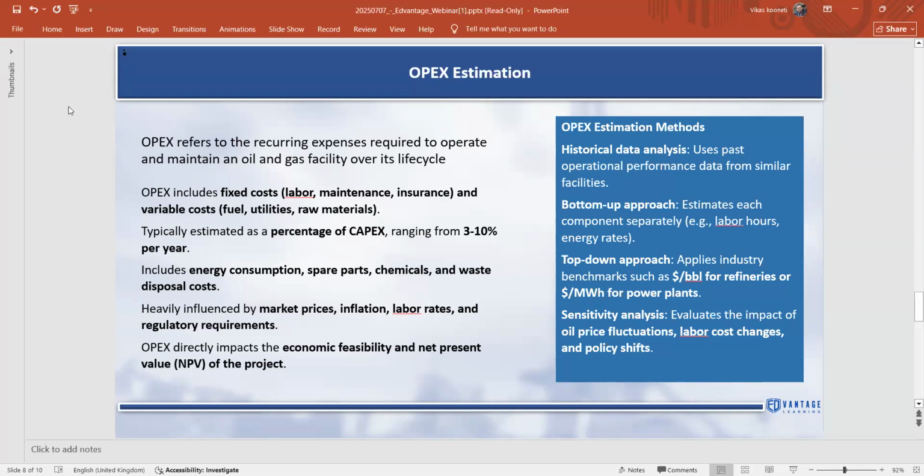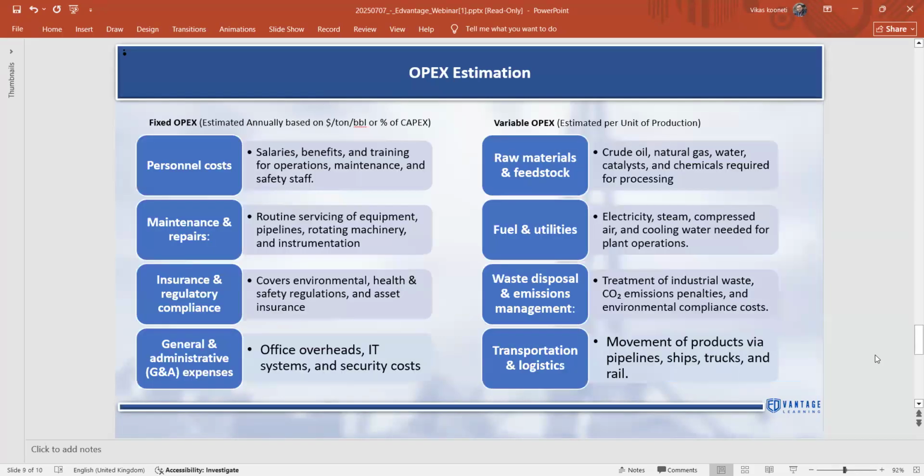Maybe suddenly market conditions change, maybe suddenly there's a new regulation on operations, or a new regulation on certain products. Your values may change or increase, right? So considering all that, you might add a buffer value as well. Obviously, interest rates change, so the time value of money changes every year as well.